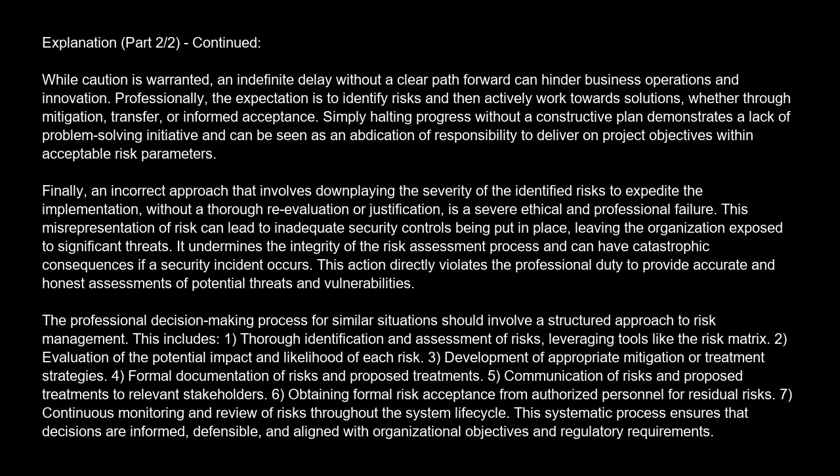Formal documentation of risks and proposed treatments. 5. Communication of risks and proposed treatments to relevant stakeholders. 6. Obtaining formal risk acceptance from authorized personnel for residual risks. 7. Continuous monitoring and review of risks throughout the system lifecycle. This systematic process ensures that decisions are informed, defensible, and aligned with organizational objectives and regulatory requirements.